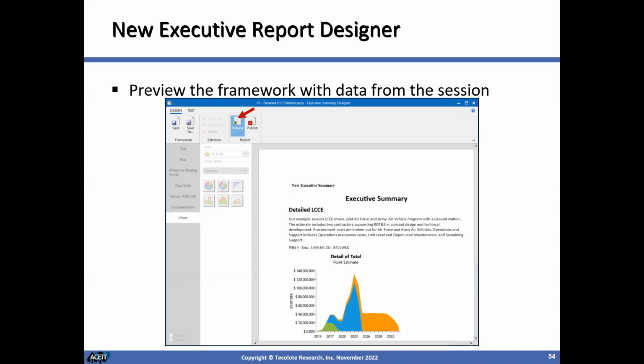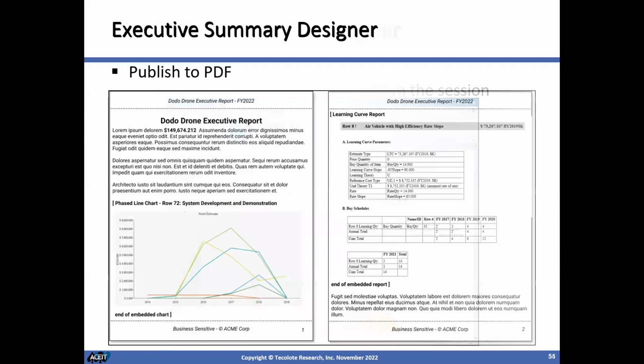So then after you, and here you get a chance to preview the report first, and then you can publish the report, and it will create for you a PDF of the narrative that you have with all these different pieces coming out of the ACE file, building up to this document.